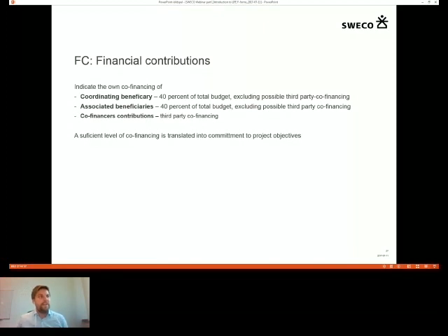So, for example, if you get 60% from the LIFE program in co-financing, you pay 20% from your own budget, and then an authority or ministry in Lithuania decides to go in and support the project with 20%. This is a quite common model in Sweden, at least. You will write into the administrative forms that there is a co-financer, write their name, and here you'll add their financing.